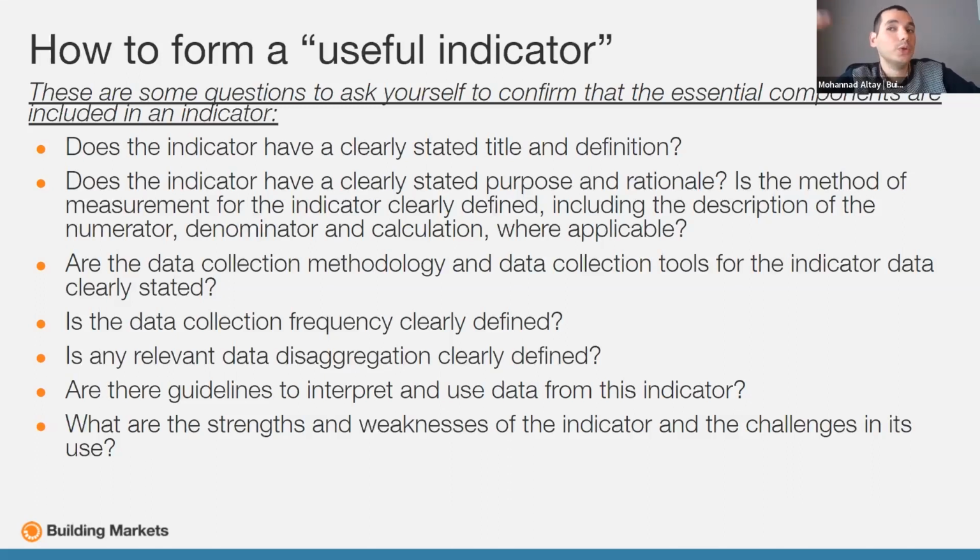They don't like to share their age or their educational background. So it is important to know that the community we are dealing with might not be comfortable sharing this data, which means it is a weakness point, because there is a chance that I will not get the data in the form that we want.